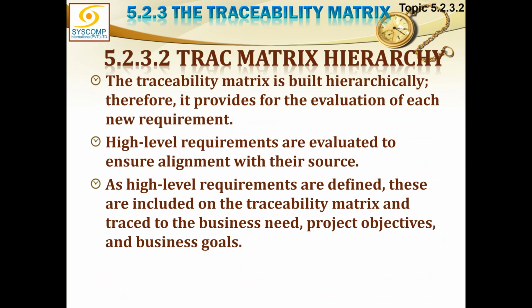High-level requirements are evaluated to ensure alignment with their source. As high-level requirements are defined, these are included on the traceability matrix and traced to the business needs, project objectives, and business goals.